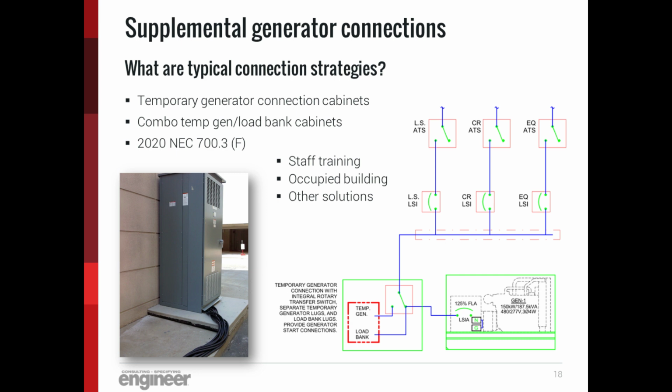Several years ago, during one of the major natural disasters that was affecting the Eastern Seaboard, there were healthcare facilities that had arranged for portable generators, and the portable generators arrived, and the staff had never really trained on what to do to connect them and to get them operating properly. As a result, there was a delay in getting backup power to those particular facilities.